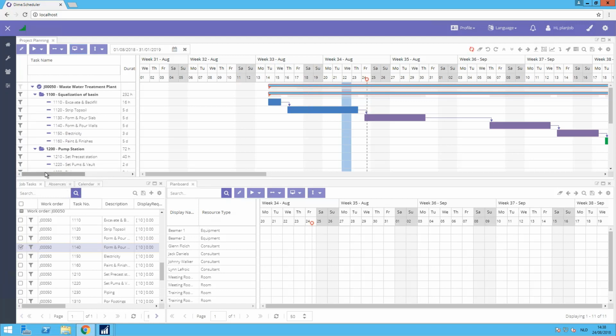So you can now link calendars as being part of the default company profile, I would say, a default calendar, which has the definition of the holidays, definition of the weekends, definition of the standard business hours. And special days maybe. For example, on Friday we stop working earlier. Could be a small example. That's a default calendar. We also have task calendars.